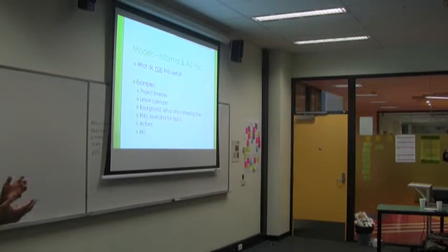Then I asked the project managers, okay, from a governance point of view, what are the things that we have to deliver for deployment? So I put those things on. And then straight away I had a visible space that actually had valuable information. Now, once I actually started the project and we started sprint 0, iteration 0, and iteration 1, I tore that wall down because we now had all that information in a better spot. But regardless, on day one, we were able to get useful information up on the wall.